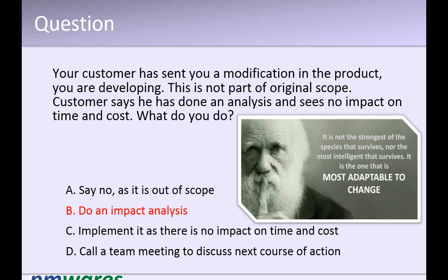If one person can decide, it should already be known, you are taking the time of 5 to 10 people of your team, which in my consideration is a waste of time of all those people. If we just set up a process that when a change comes, we will go with this process, then there is no need of any team meeting. That is what project management is saying: have a system in place so that people should not put more effort into very regular stuff.